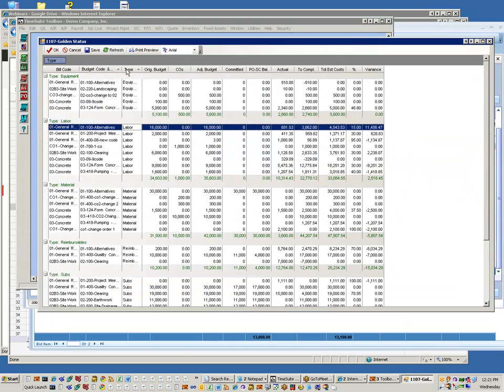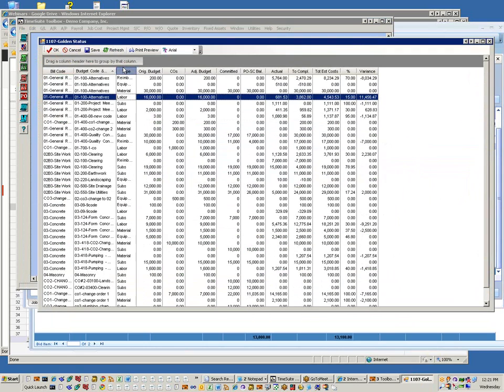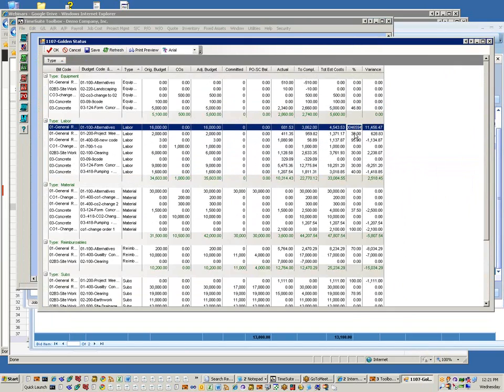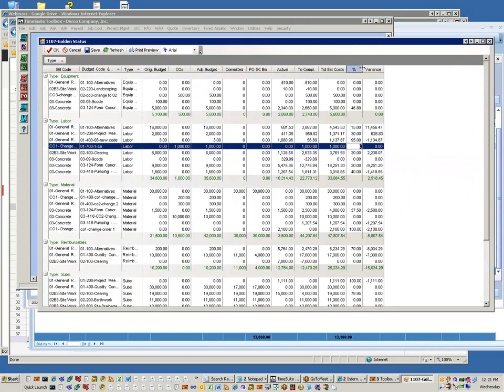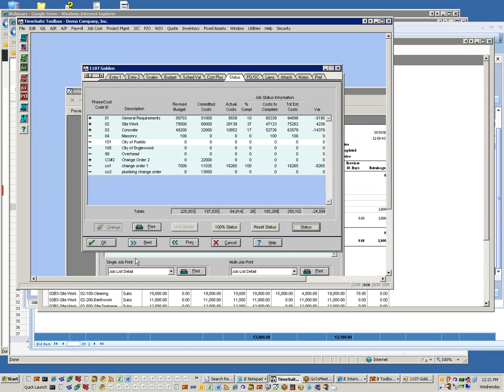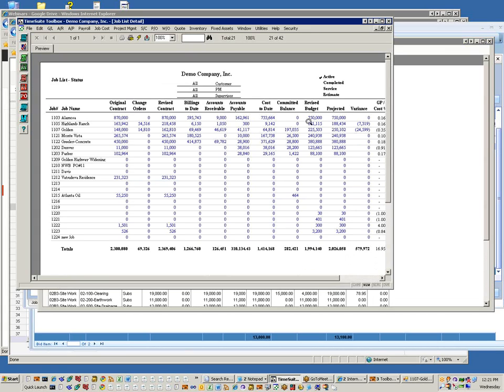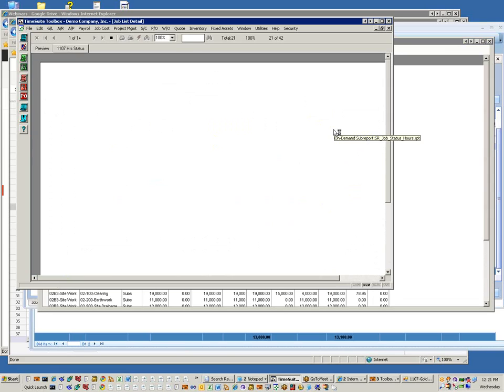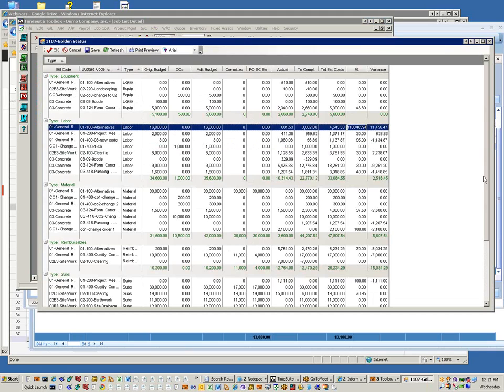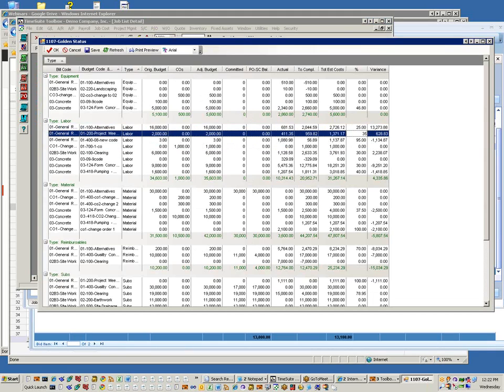Like the cost control webinars, we talk about how you project your jobs and your projects. If you're labor intensive, you'd project your labor over here separately from your equipment, and you would use, I'm just going to touch on this, this worksheet that you get from this projected column. So for your cost control, you'll get your foreman or superintendent or project managers to come in and put a percentage here. So notice we have 15, 30, 95.